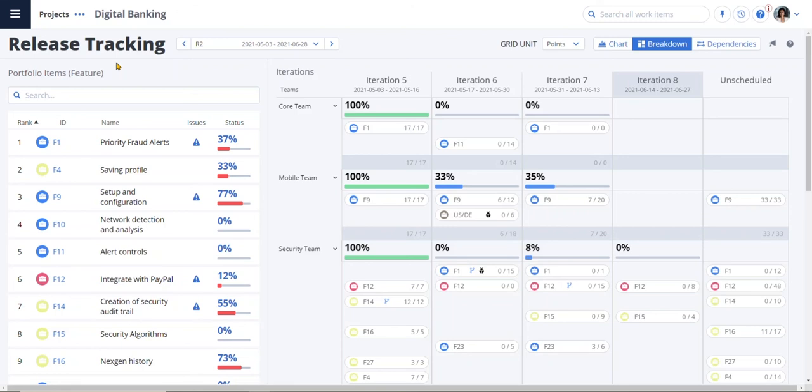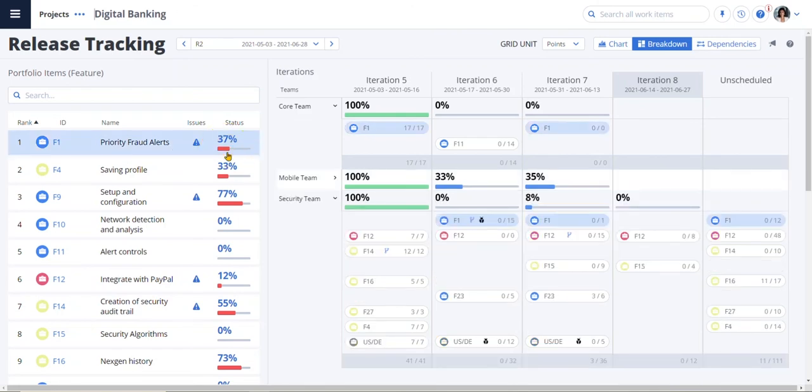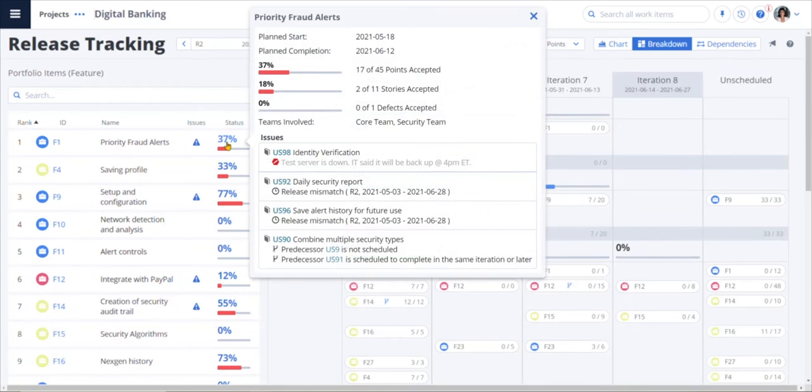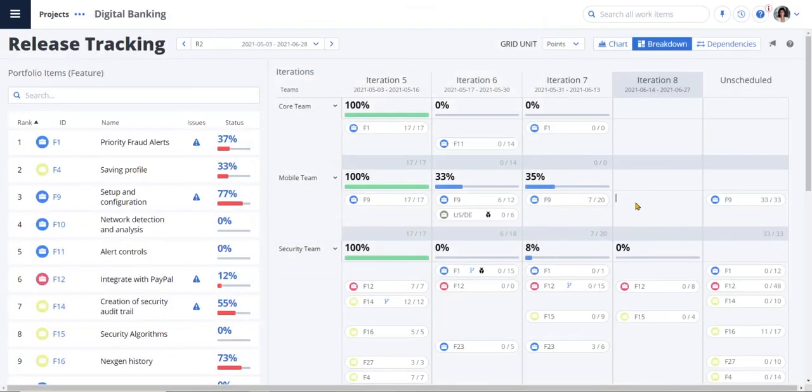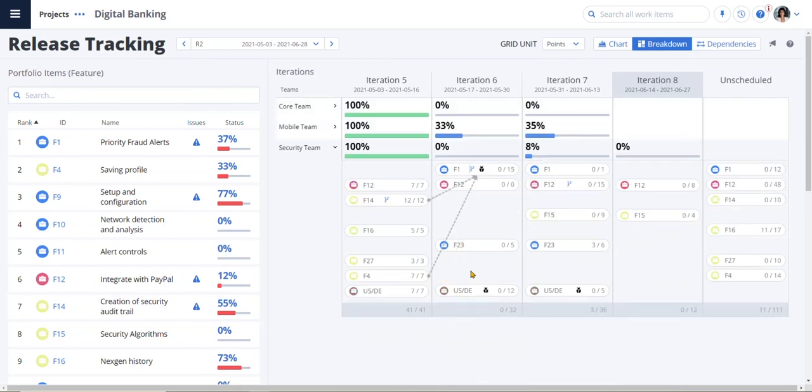Here Petra can see that the priority fraud alerts is red and drills in to see what's going on. He can understand things like the test server is down and therefore stalling our ability to test the user story. He'll want to get that resolved. He can also look across the iterations and see defects and dependencies to learn more. He can view dependencies at both the story and feature level and understand any impact to our delivery.